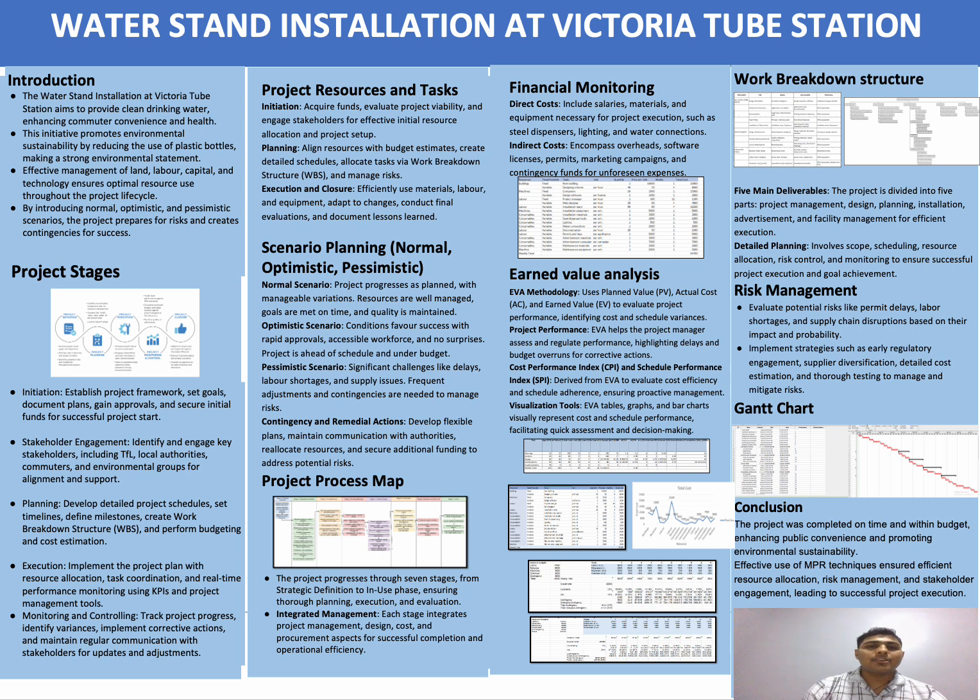Third one, scenario planning. Three different scenario was planned. First, normal scenario. Second, optimistic scenario. And third, pessimistic scenario. Each scenario had its own set of assumption and associated cost. Fourth one, Excel spreadsheet development. I created comprehensive Excel spreadsheet to calculate the weekly and overall cost for each scenario. This spreadsheet is including column for the type of cost, weeks, and contingencies.